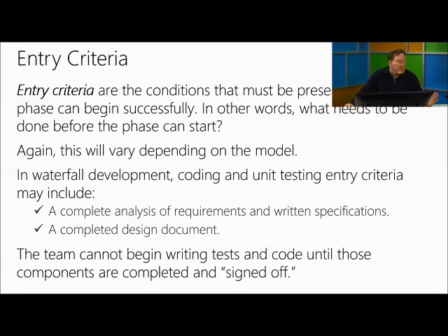So teams that are looking at entry criteria, most of the time they look for sign-off on that criteria. As we think about the sign-off, who's usually doing that sign-off? Is that usually a dev lead or test manager? Or? Yeah, that's going to be determined as well, but that's going to be your test lead who is going to sign off on these criteria. Now, specifically, if we're going to talk about entry criteria into a phase, like say you want to get into the stabilization phase, the entry criteria of the stabilization phase may be things like unit test code coverage and things like that. Okay. Cool.